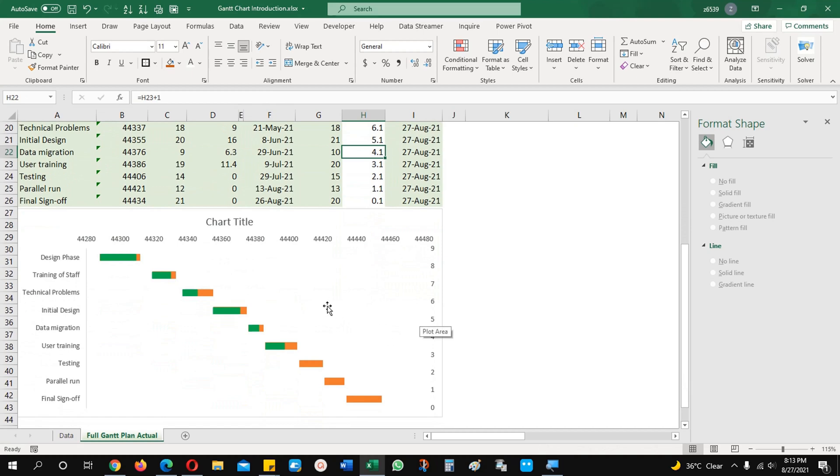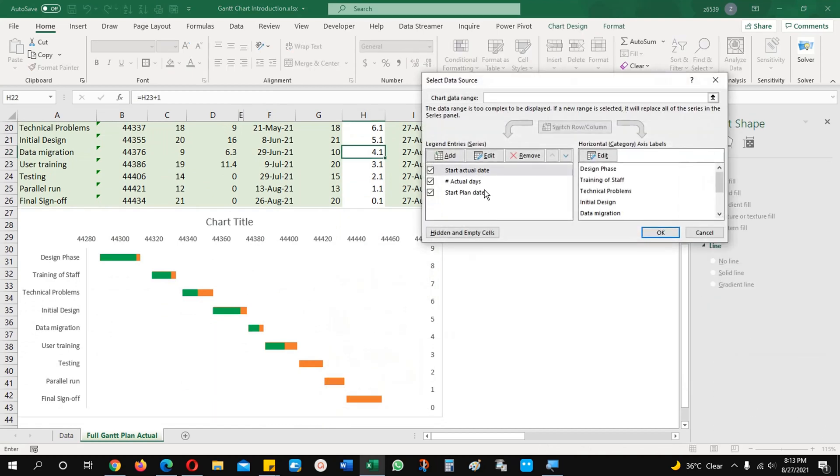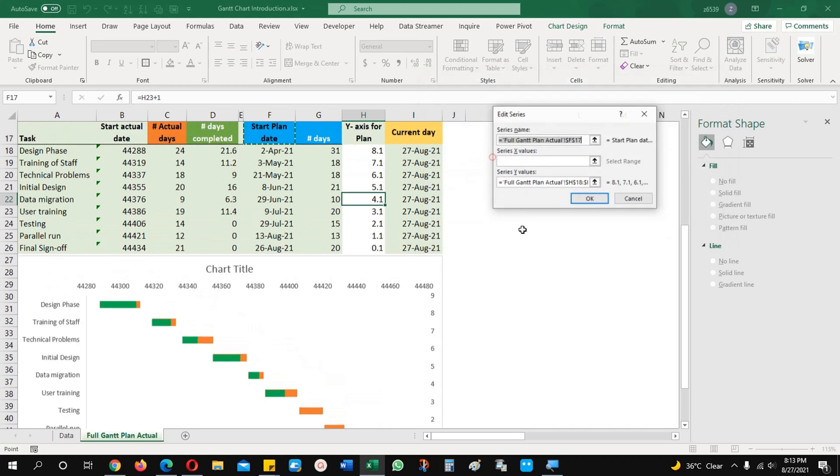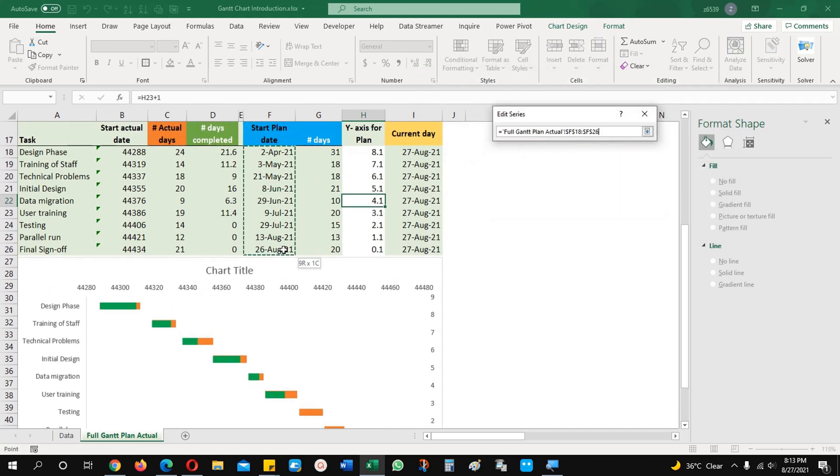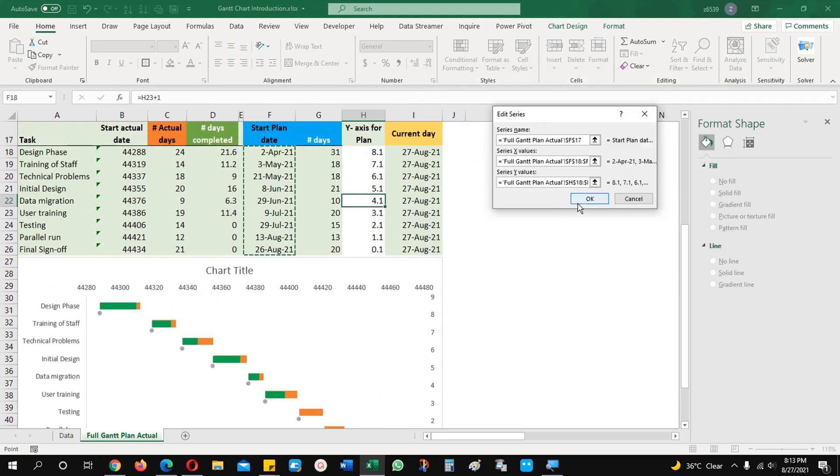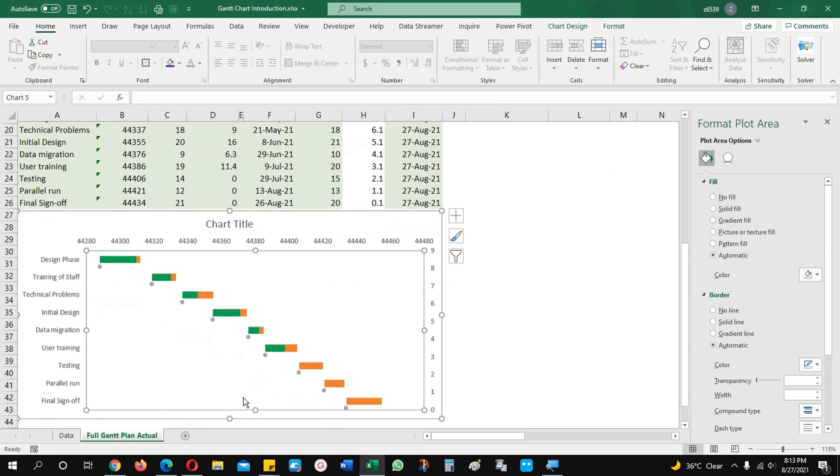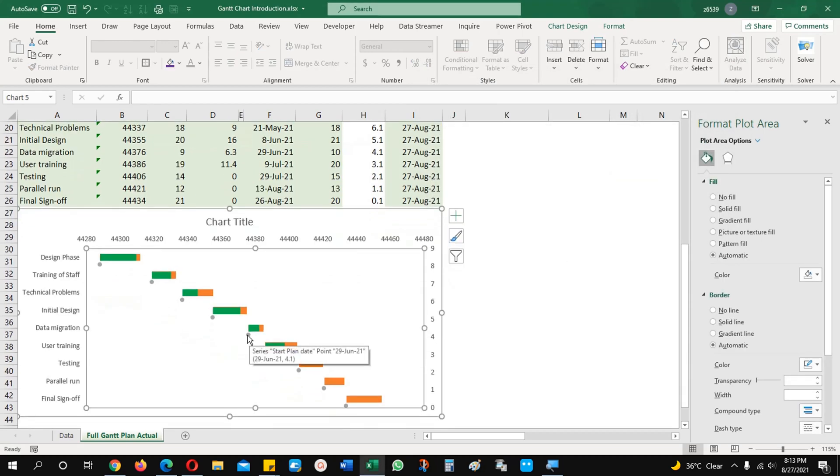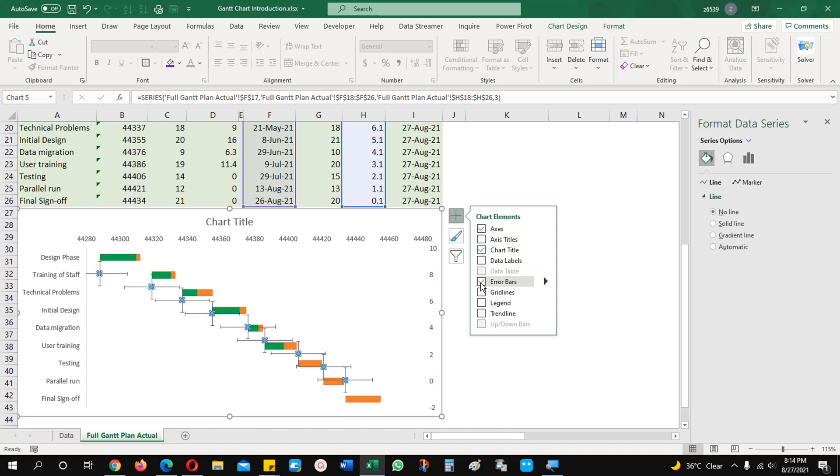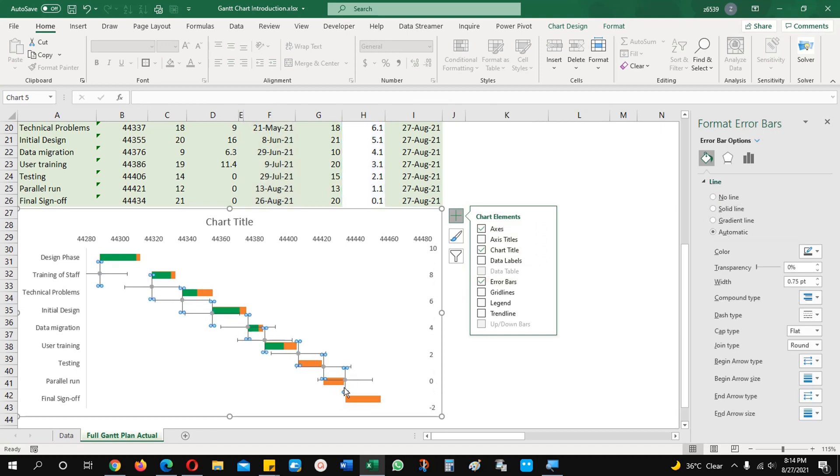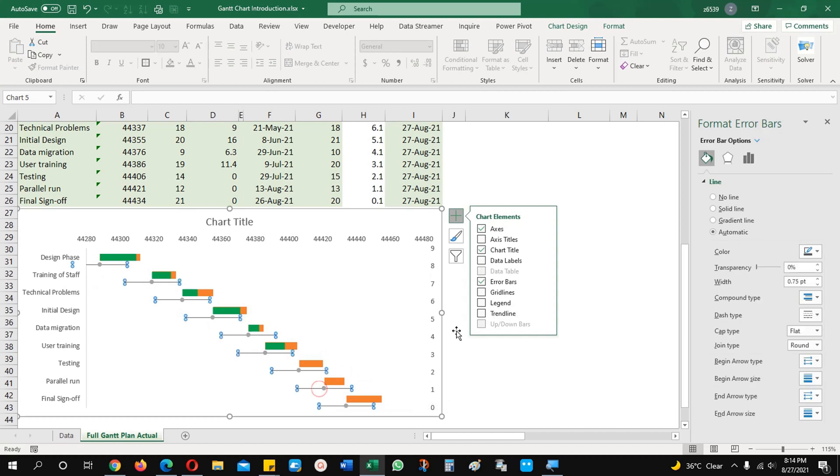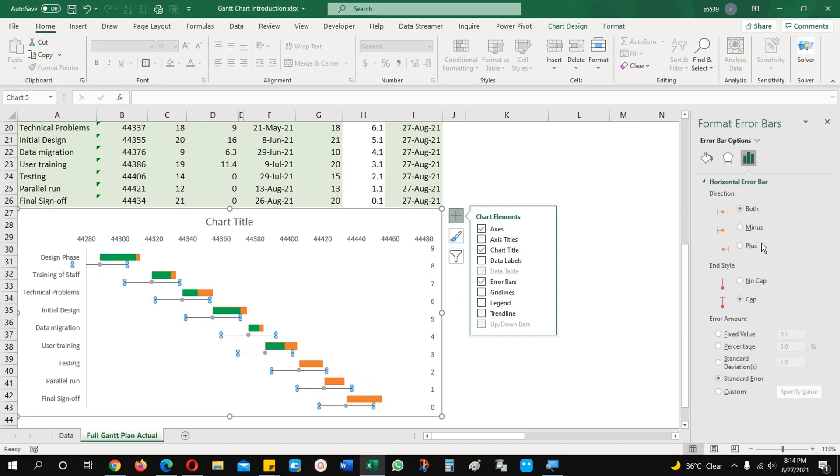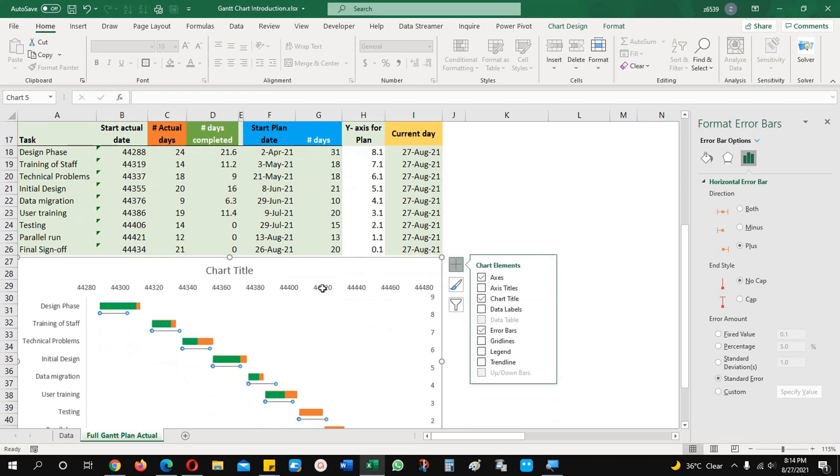You will see here what I am going to click on the right, select data, start plan date, add it and x axis value, you will define it to this number. You can see it here, one dot appears here now. Just click on this dot, go to plus sign and error bars and you can see horizontal and vertical bars are available. We need these bars and we are keeping these bars and I am going to click on plus, no cap and I am going to give this data range already with it. Number of days we can give it to it, how many days are there.